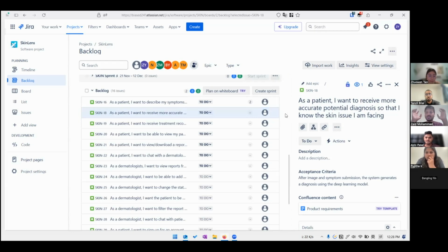Tanzi, let me explain what story points are first, okay? Story point is basically a unit we assign to each story. Suppose there are 5 user stories. Now we assign story points to each of these stories, and then based on our capacity, we decide how many points we can do in this sprint. Suppose the 5 user stories have 60 points total.